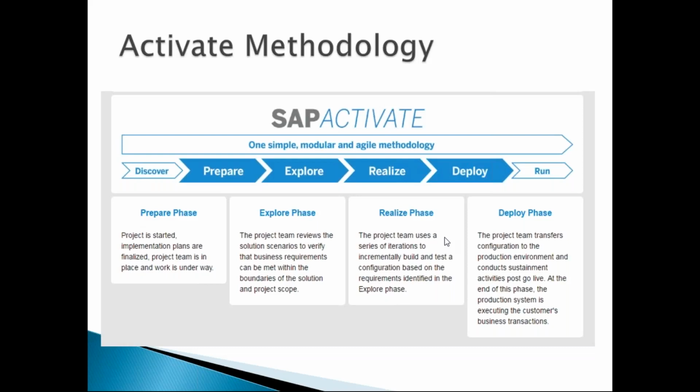There in the testing system is where the customers will perform all the testing, and then we move it to the production system in the deploy phase. So in the realize phase, we use 2 systems, development and testing, and the production system is what we see in the deploy phase. These are all the 4 important stages of the standard success factors implementation methodology that we follow.